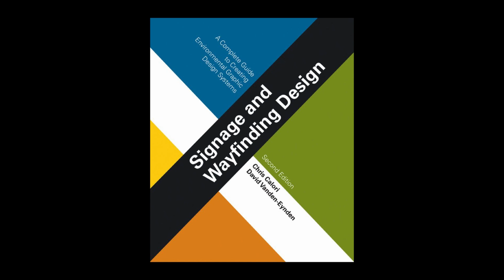On projects outside the U.S., the bidding phase is sometimes referred to as the tendering phase. Remember, EG designers very rarely procure sign fabrication services because they don't have the hefty financial or legal resources needed to enter into a construction industry contract. Rather, the sign fabrication contract is let by an outside entity who represents the client, such as a GC, CM, or a government or corporate procurement department.